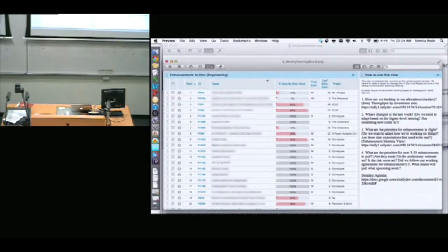But what I love about Reinertson is he really blows you away with all the things you could measure, right? Cost of delay, right? Really complicated measures for cost of delay, and you're pretty sure it would save your business if you could figure it out. But it's hard to figure out. And just when you're ready to give up on all these formulas, he says, if you come up with any scheme that's anything like a measure, or puts a number on value, if you scored value on a scale of 0 to 100 and did that with any kind of discipline, you'd be better off than you probably are today, because it's so hard to measure value and people struggle with it so much, right? So it's interesting. We're trying to be value driven, and that can just be so hard to do.